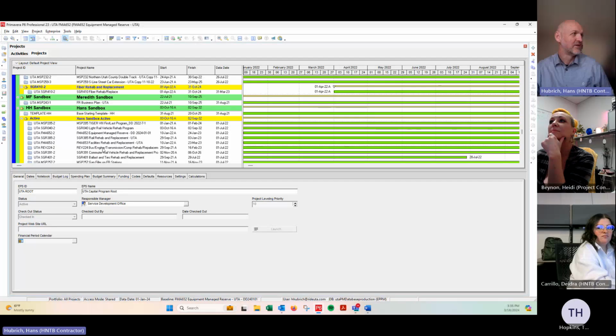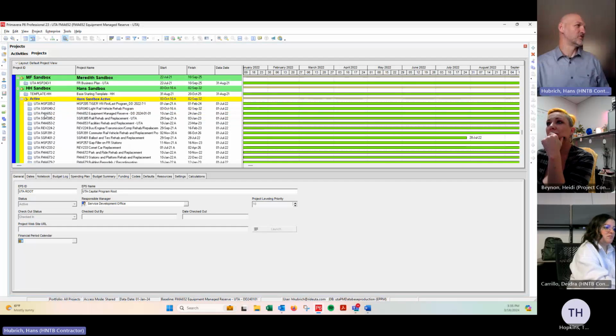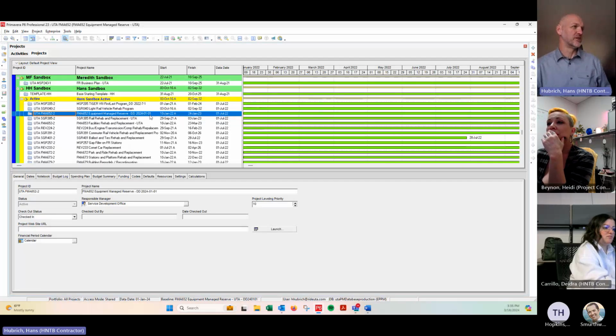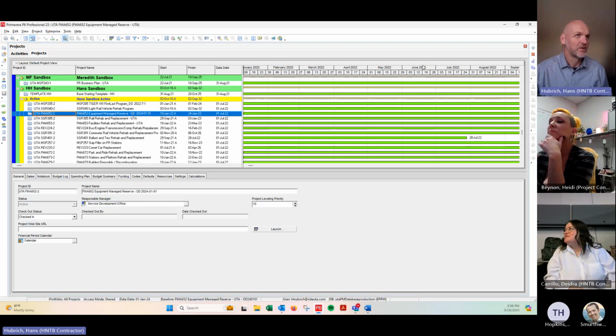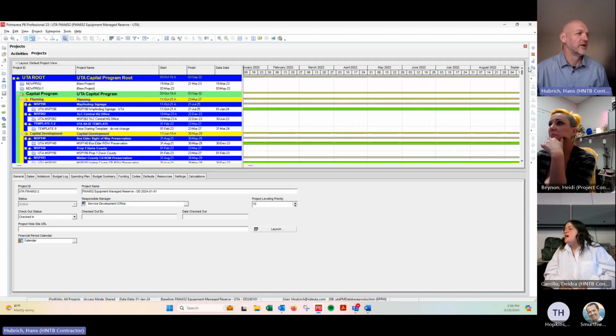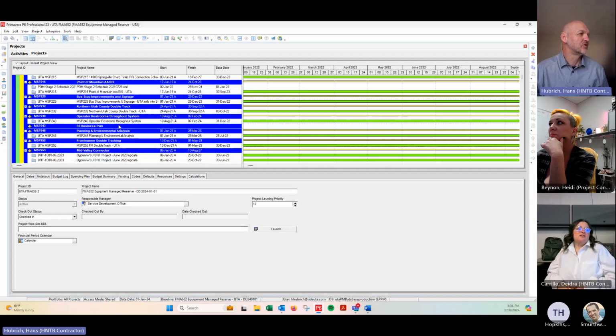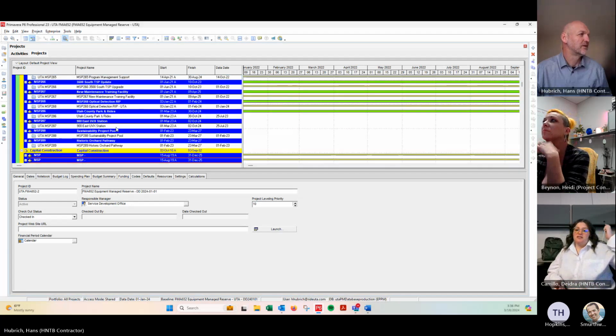So my backup copy of this project, FMA 652, is sitting down here. I put the data date on it so I can know if I mess up above in the live copy, that I can just copy and paste this one back up above. So once that's there, I jump back into the live schedule up above.